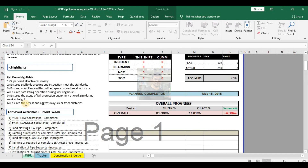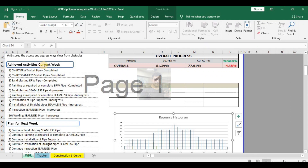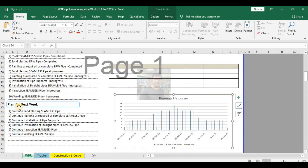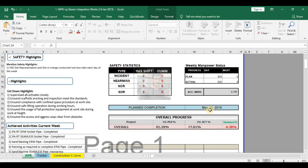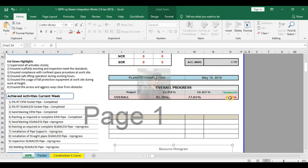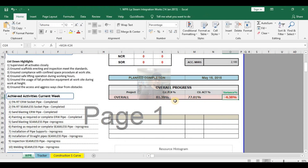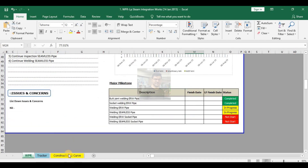If you want to see the highlights of a weekly report: these are safety highlights, these are achieved activities for the current week, these are planned for next week, and planned completion. This is actually an old report from 2015, so the completion date was May 2015. This one is variance — we planned to be 80 to 81 percent complete but today it is 77 percent complete.